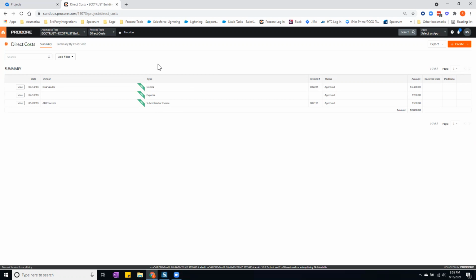From here, you can actually create a Procore budget tool or budget view that will have drill down capabilities per cost code so that you can get detailed itemized transactions of what is making up your cost per line item.